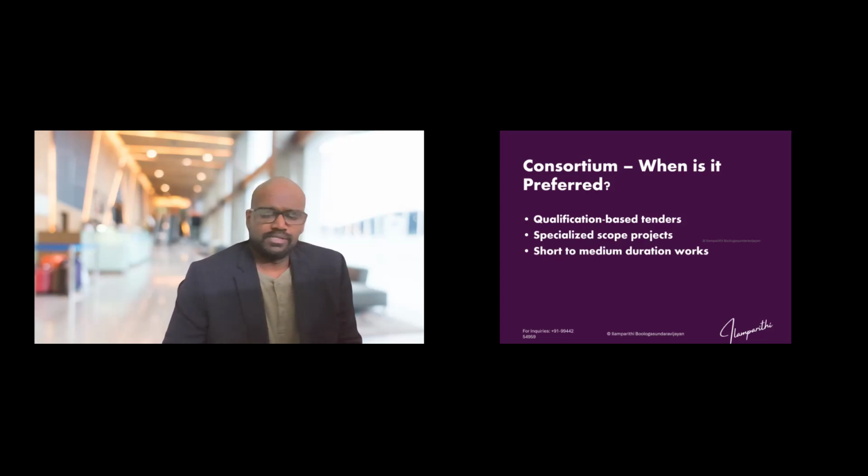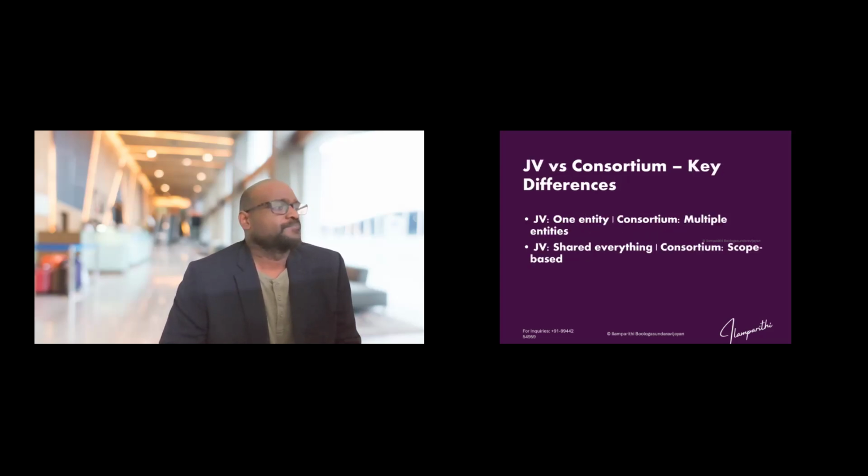Sometimes there may be three parties. One party will give procurement expertise and one party will give construction expertise. They all three together go for the tender based on the specialized scope of the project. And this is usually preferred in short to medium duration works, not for long duration works.